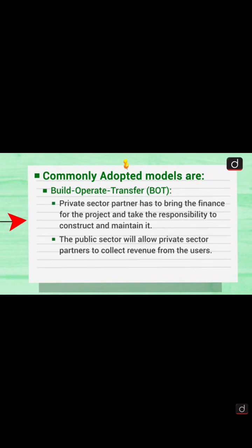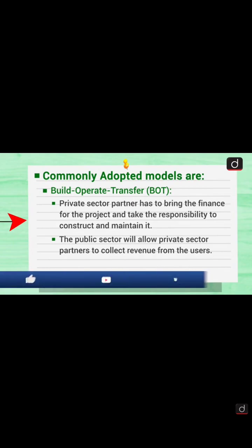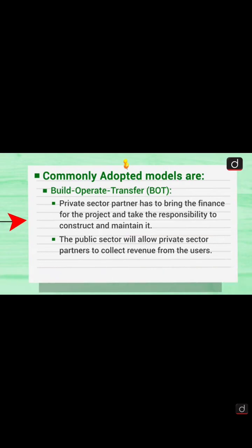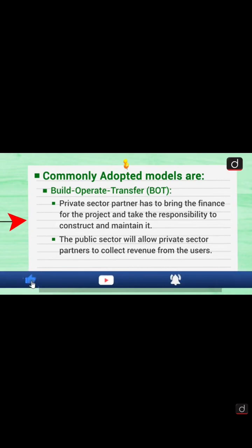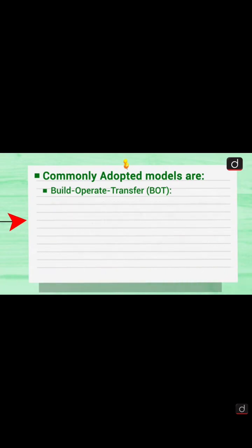sector. Now the private sector partner has to bring the finance for the project and take the responsibility to construct and maintain it. Now the public sector will allow the private sector partner to collect revenues from the users, like we know it happens with toll tax and all things. They are giving the example of national highway projects contracted by NHAI under the PPP model.